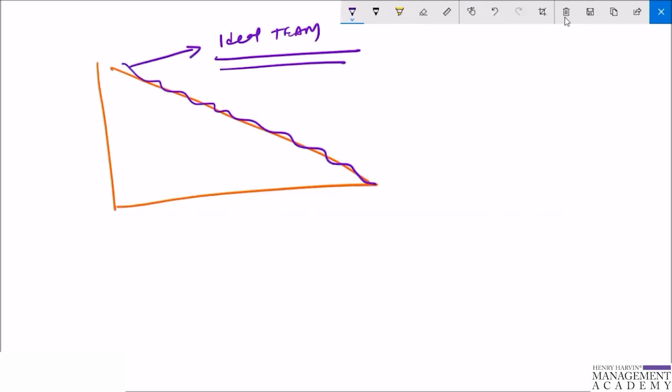If the team is working like this in the graph, this is a great team, and they were able to organize themselves, and it indicates a great product owner who understands the reason for the locked sprint backlog, and a great Scrum Master who is helping the team to burn the chart. This also means the team is not overcommitting and is finishing the sprint backlog on time, and the team is able to estimate capacity correctly. So no corrective action is necessary in this case. This is team number one. Let's create some space here so that we can draw all the graphs together.